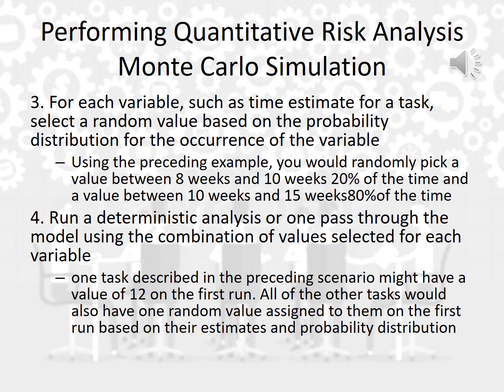So most likely that task can be finished in 10 weeks. Optimistically it can be finished in 8 weeks. Pessimistically it can be finished in 12 weeks. Here we can have a 20%, as we said, of making that task finish between week 8 and week 10. So any value between 8 and 10 will be counted as the 20%.